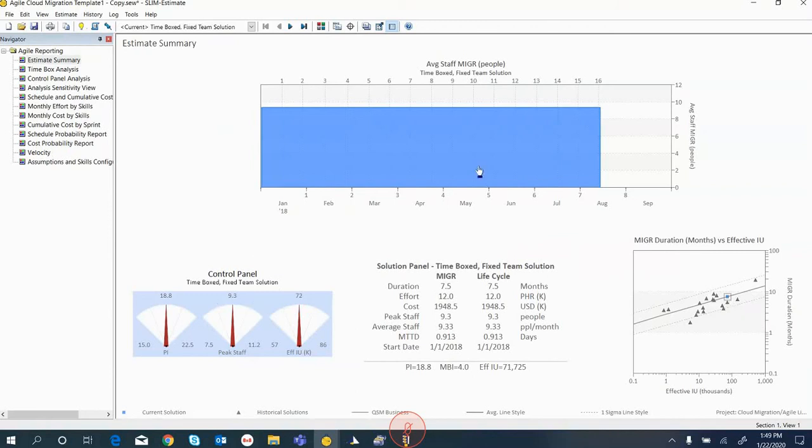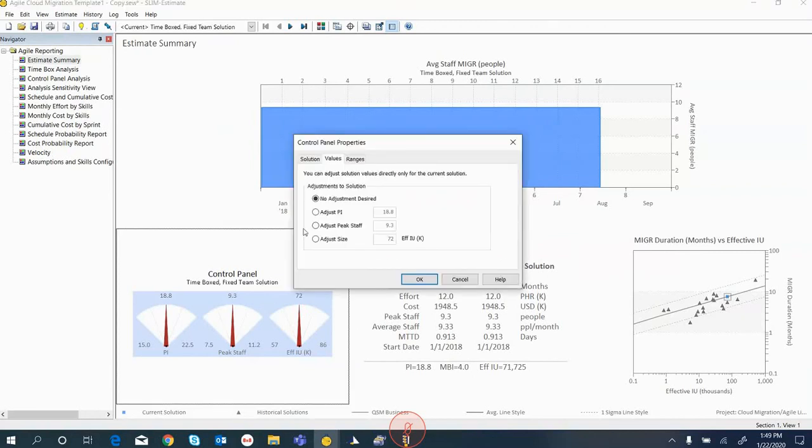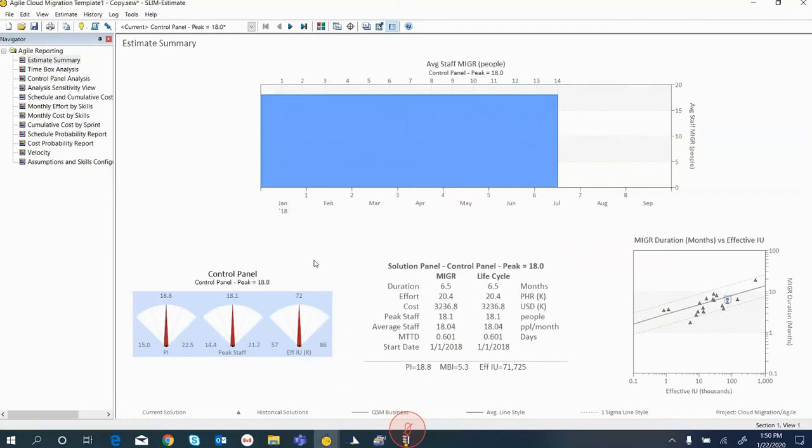So for example, it's telling me here it's going to take 16 sprints to deliver within 7.5 months. Well, what if I need to get done in 6 months? Is that possible? And I can say, okay, great. Will it help me to add that extra Scrum team in? What if I add people? Will it help? And a lot of times, we actually get diminishing returns when we add a lot of people. When I hit OK, it runs the estimate.